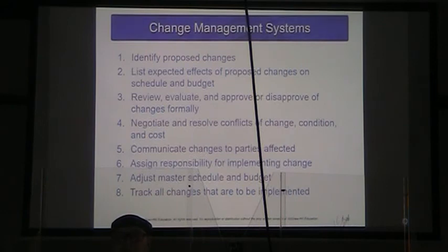We need to look at what the effects of these proposed changes are on our schedule and budget, right? Is this a simplification that's going to let us reduce our schedule and budget, or is this something where it's going to make the end of our project better, but it means we have to do more work?